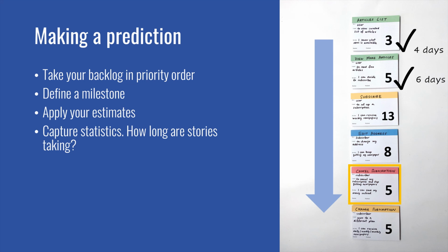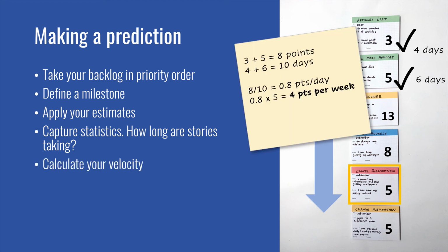If you don't use sprints, then focus on the duration of the story, starting from when the work began. In this simple example, the developers managed 8 points in 10 days, which works out at 4 points per work week. This is smaller than a normal team velocity because our example has to fit on one slide. However, it's not technically possible to compare velocities. Do be careful of that.